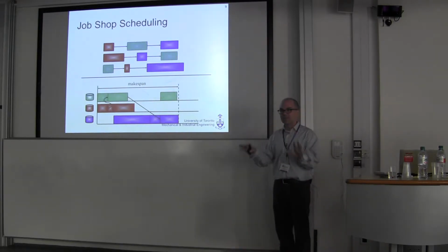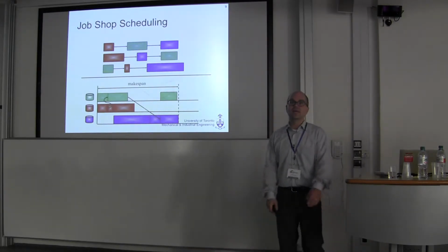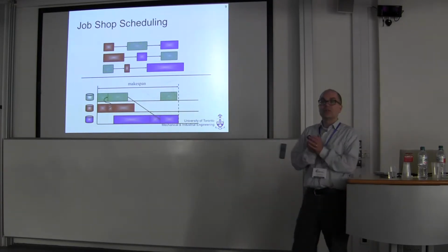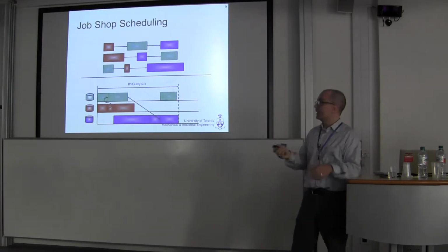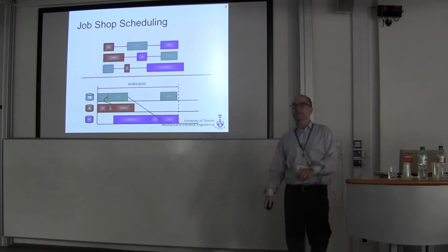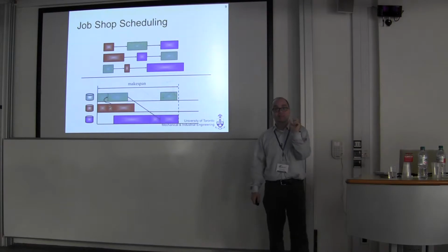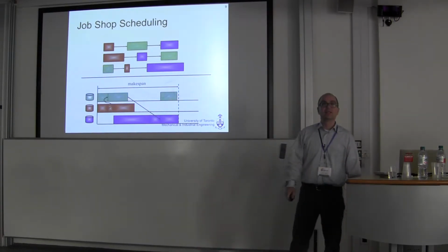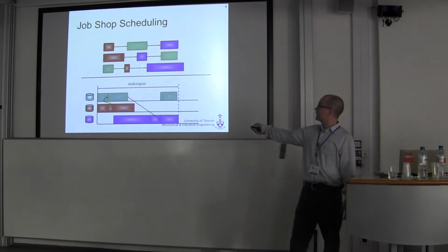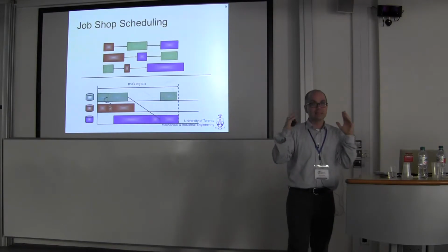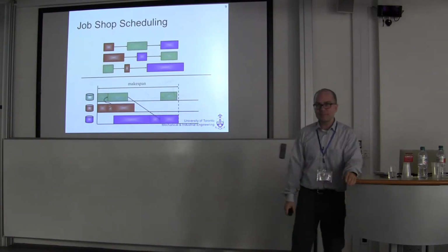The rest of them will make a big mess of my drawing. And I've satisfied the resource constraints. So in the classical problem, the resource can only do one thing at a time. And what that means is essentially we have to have all these green activities sequenced in some sequence. Okay, red has to be sequenced, this has to be sequenced, so that these precedence constraints are satisfied and we've minimized the makespan. So that is the job shop scheduling problem, the classical one.